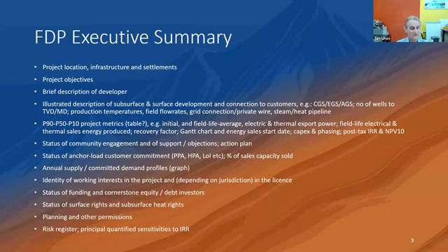The other things that I guess of importance in any summary is to make sure that the decision makers know who owns the project. So that can be yourself as a developer, it can be various other actors or your co-investors. And also, in some jurisdictions, you need a license to operate geothermal projects, as in a license to operate. And in that case, there also will be working interest in the license. This won't go ahead without equity and debt, so you do need to report in the full development plan who are the likely equity and debt investors.